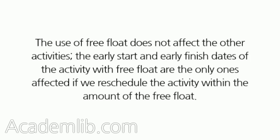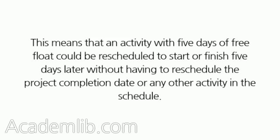The use of free float does not affect the other activities. The early start and early finish dates of the activity with free float are the only ones affected if we reschedule the activity within the amount of the free float. This means that an activity with 5 days of free float could be rescheduled to start or finish 5 days later without having to reschedule the project completion date or any other activity in the schedule.